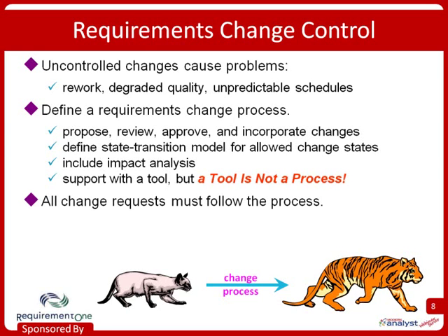Now, I have this philosophy that all change requests must follow the process. I might go walking down the hall and somebody, in fact, I used to do this at Kodak, would say, hey, I got an idea for a change in that system you guys are working on. I'd say, okay, tell me about it. And they describe the change. I'd say, okay, that sounds pretty good. When you get back to your office, could you please put that in our change control tool as a request, and we'll take care of it.